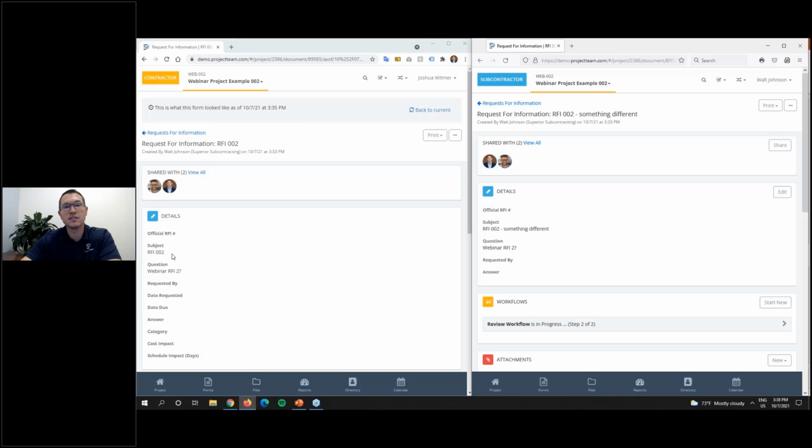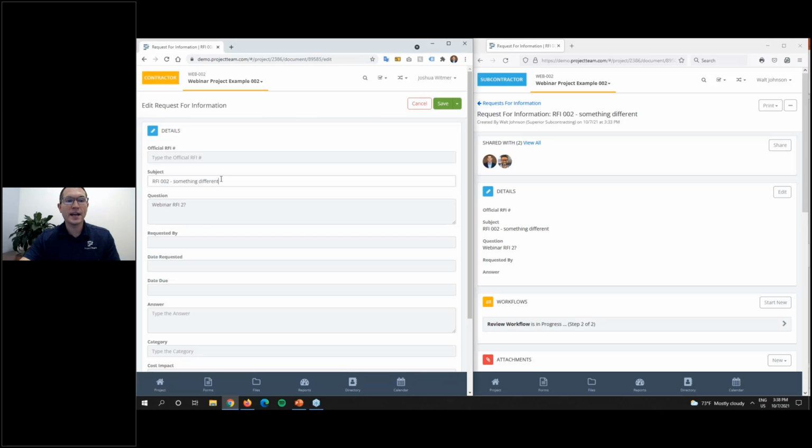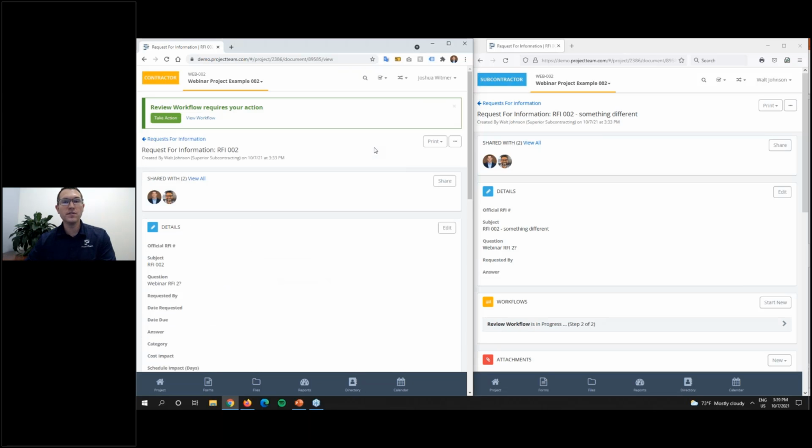So in this case, if I had multiple screens up or whatever, I can compare that data, see what's wrong or see what has been edited. Maybe it shouldn't have been edited. Go back to the current view, edit that back, and take that information away. Okay, so even though people may have access to fields that you've given them to, you always have the ability to go back in time, view what that thing looked like at that previous time and date, and then remake the appropriate changes.